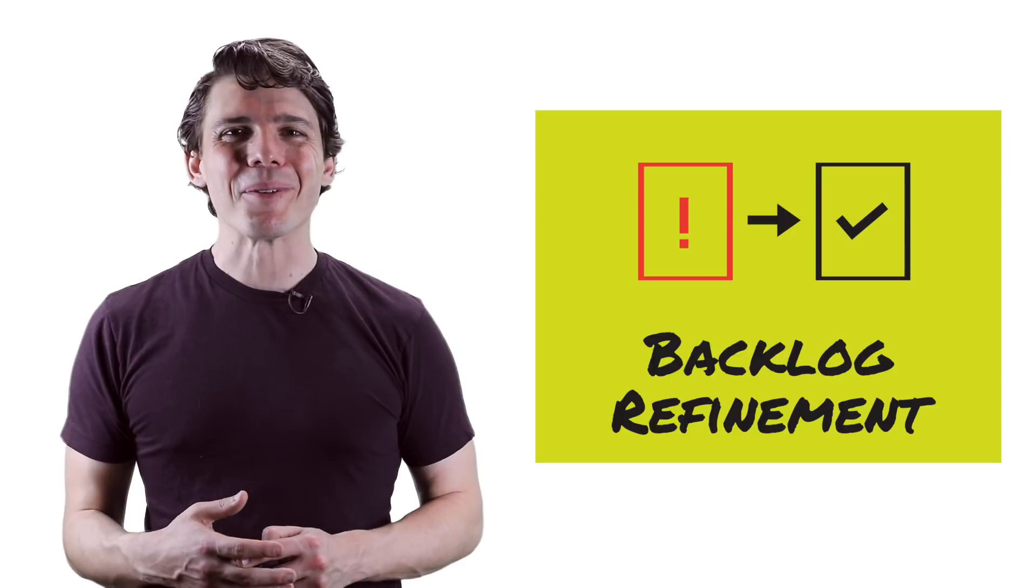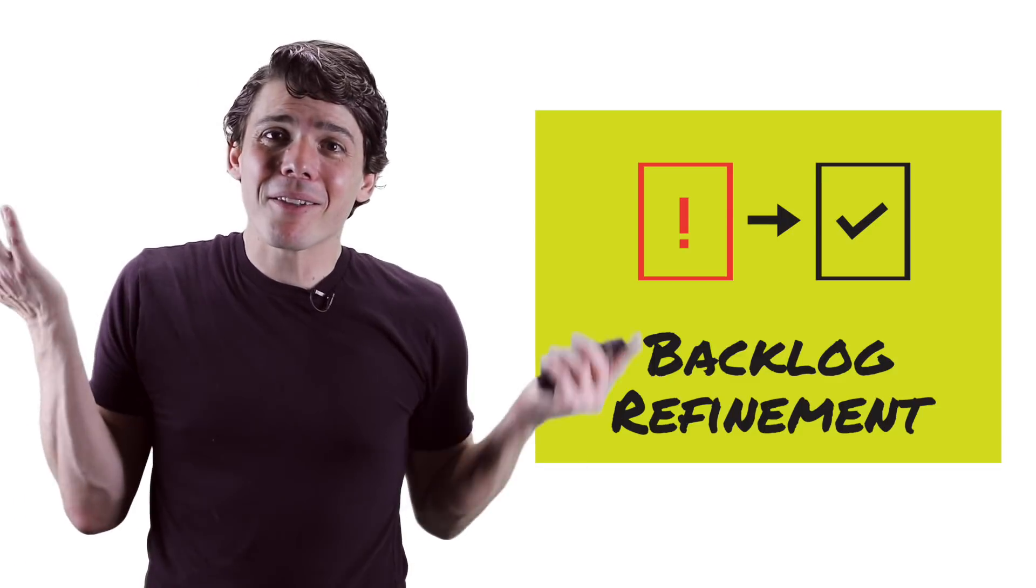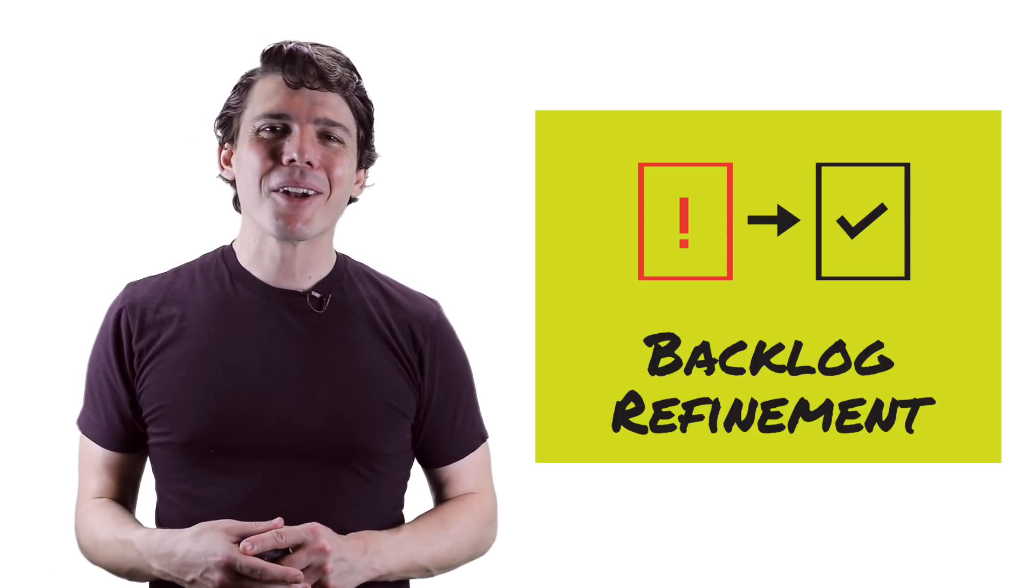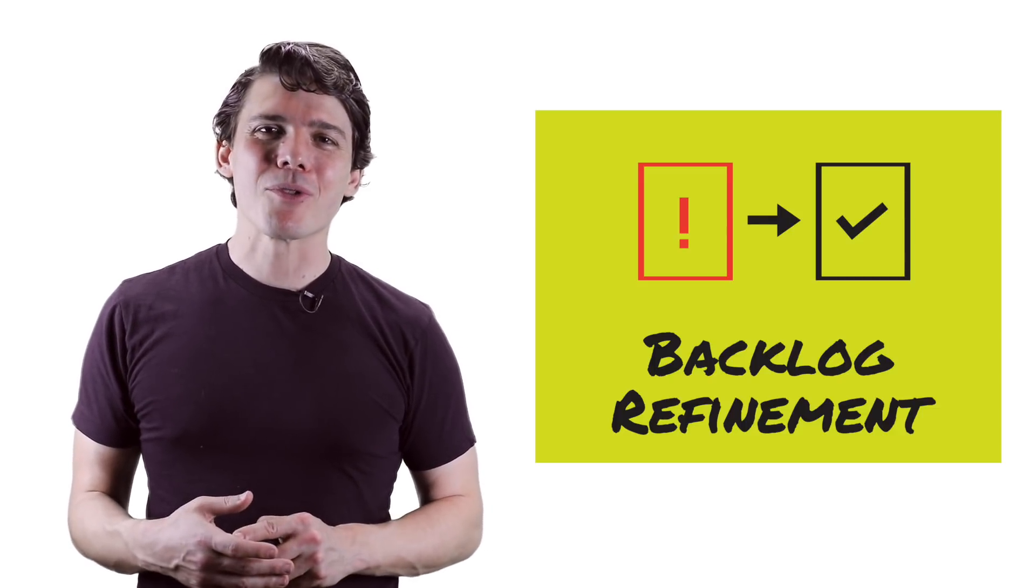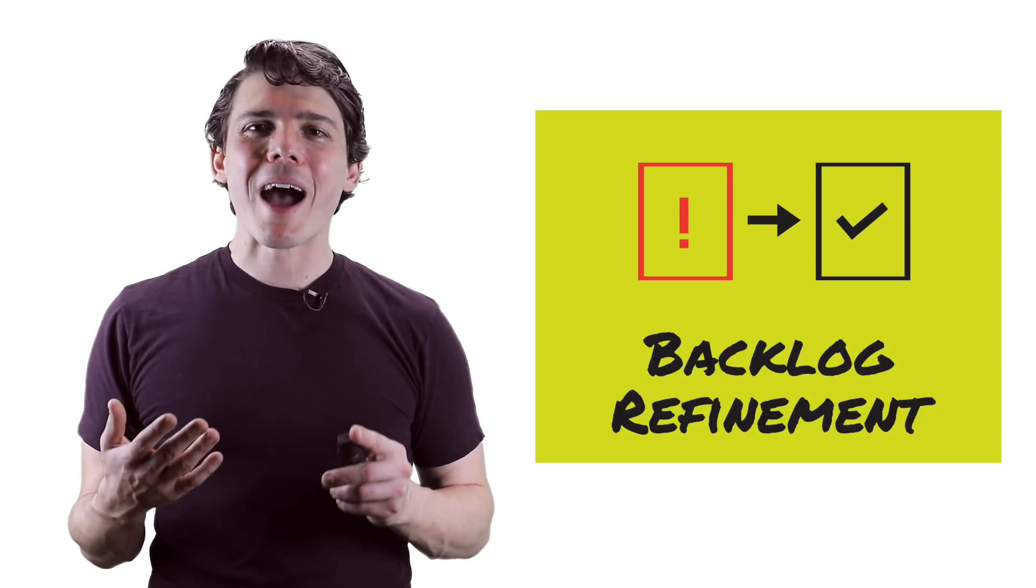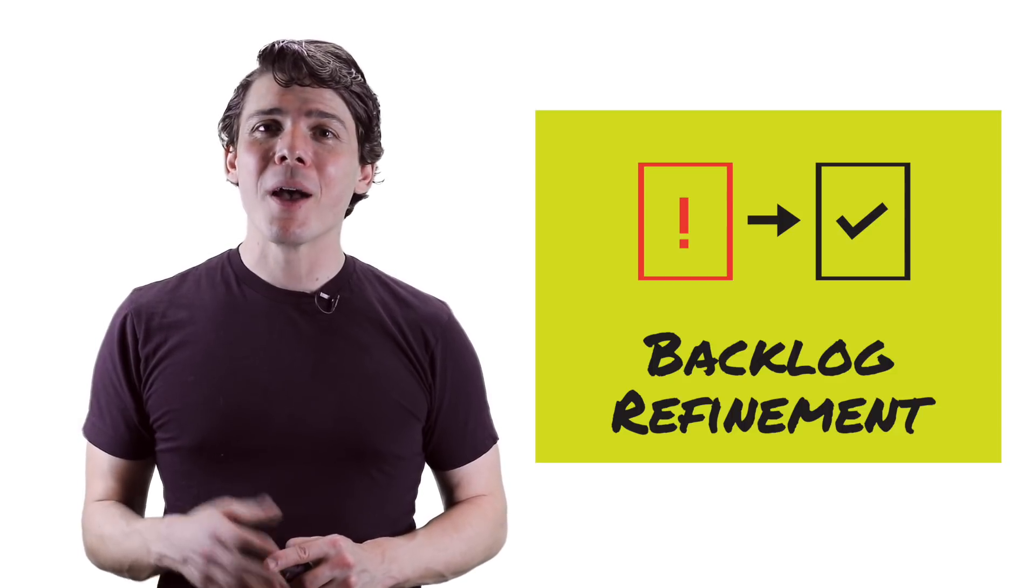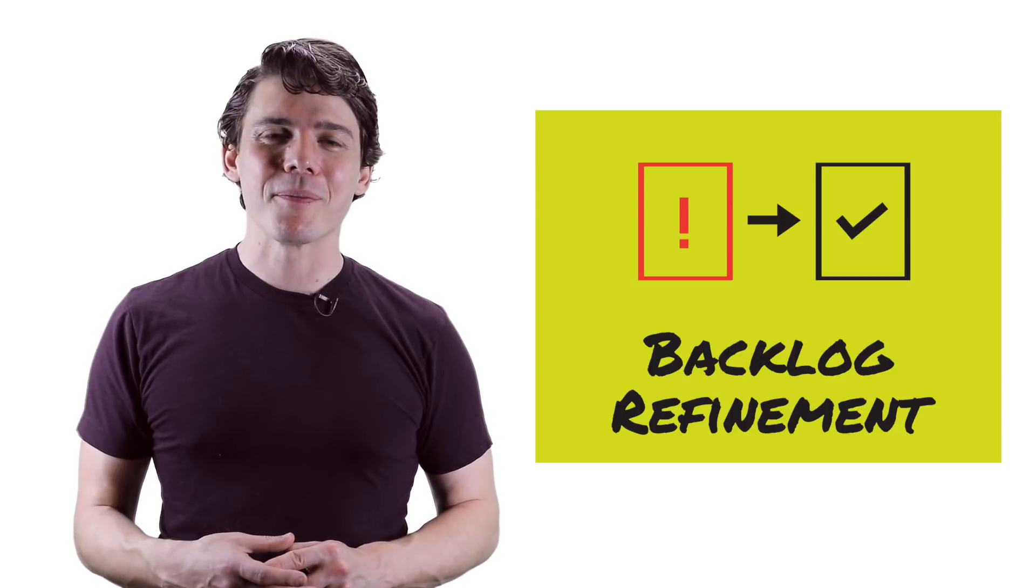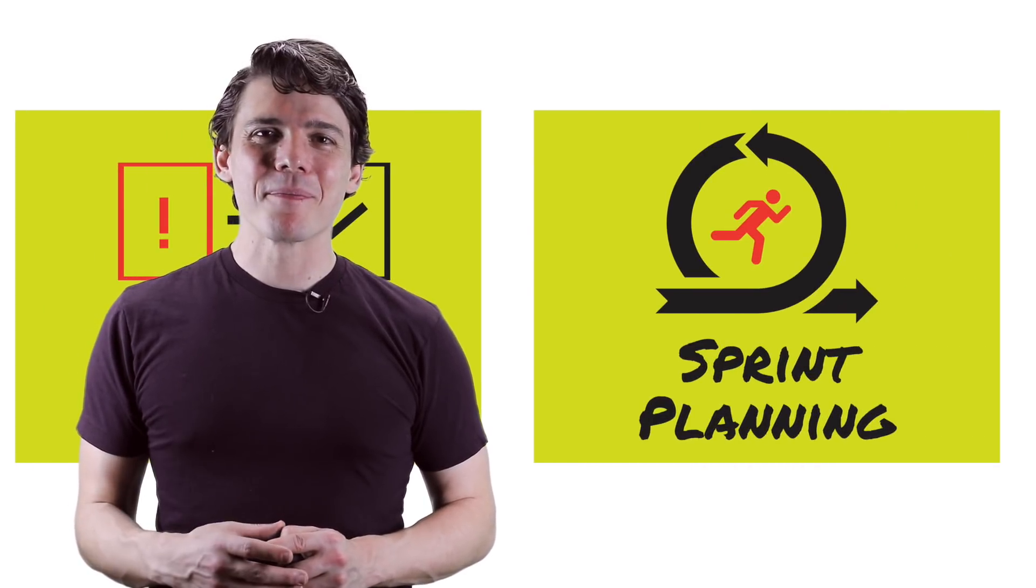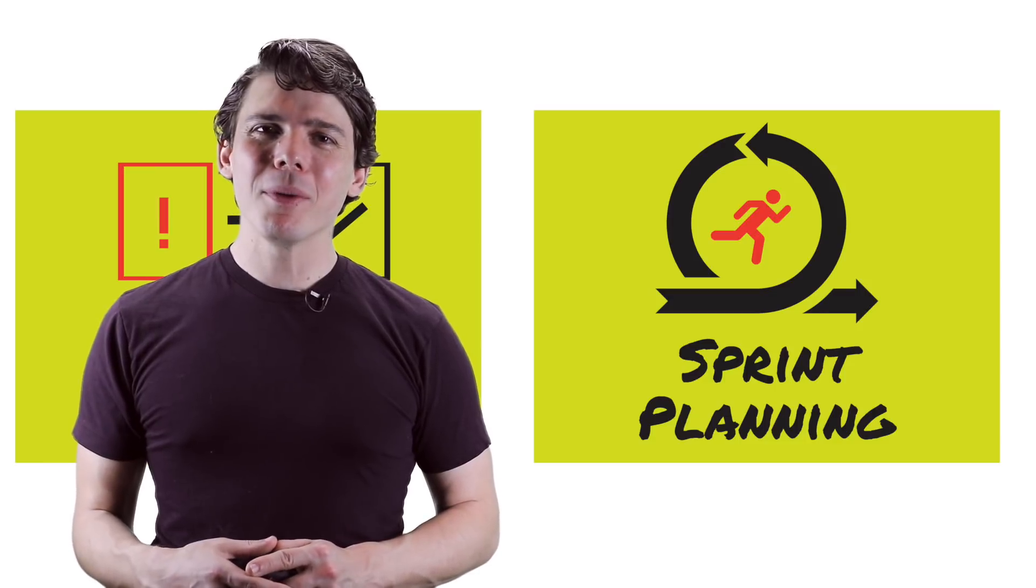For instance, suppose the product owner says that they would like a cup of hot coffee. A member of the development team might ask, how hot is hot? After a brief conversation, they'll decide on a more objective measurement of temperature and update the user story. Our goal will be to have one and a half to two sprints worth of ready stories by the time we start our next sprint.